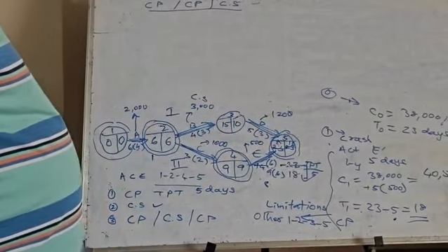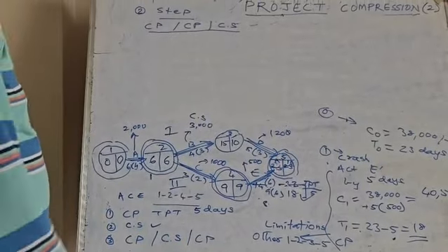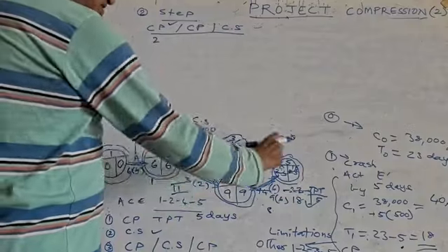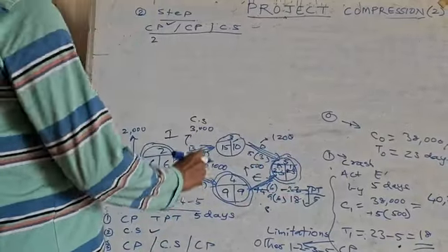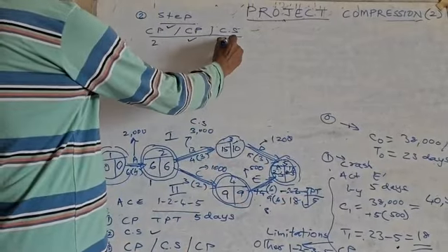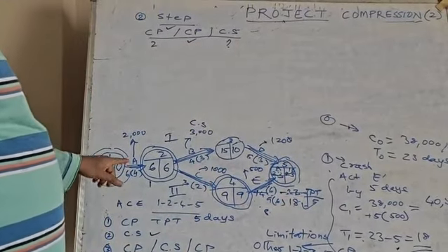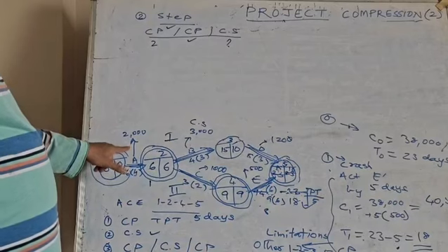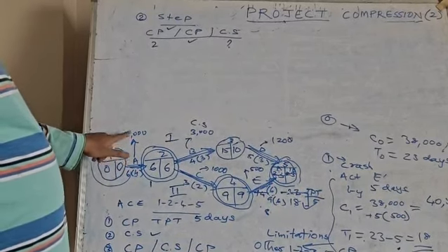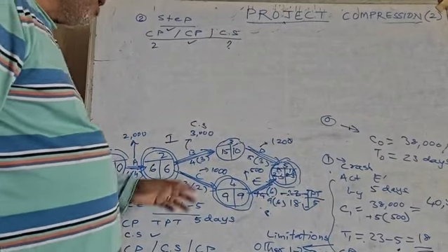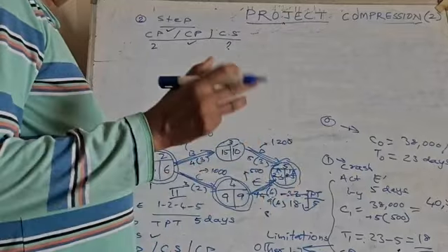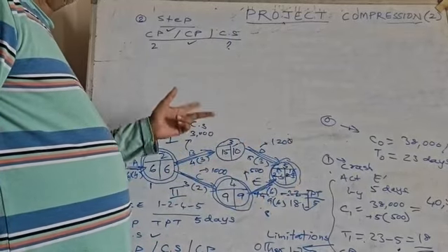Now going to the next step, if we follow the same way, again take the critical path. So there are two critical paths now, one path this way, one path this way. Then check the crash potential available with all, and the cost slope now. Suppose this is a common activity, I can crash it by 2 days, but how much will the cost increase? 2000 rupees.